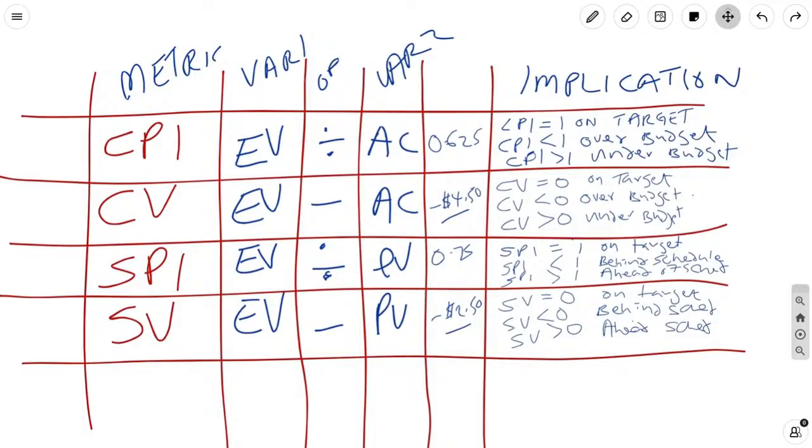I've seen it happen time and time again. People make up numbers, they make up stuff, and they tell you everything is good until you look under the hood. I'll give you an example. We're working a project, and management took a look at the earned value metrics, and they said, knowing the kind of contract that we have, there is no way your cost performance index should be a 1.25. Why is that? Well, the work that we're doing is a level of effort project, and there's no way you're putting in more effort than you should. It's a level of effort. It's straightforward. We're paid by the hours. We don't go over the hours by contract.